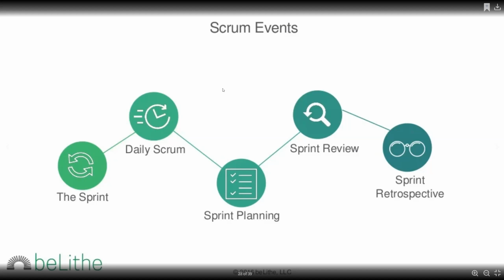So sprint planning also goes deeper. We're going to take each one later on and go much deeper to break them down, because it involves what we call t-shirt sizing, which means the user stories are planned, and then we have to t-shirt size them. T-shirt sizing means, is this a small, medium, large, or extra large? That's how you assign the user stories. So it's a planning that involves all stakeholders. The development team is available, design is available, QA, they're all available, and they all have their input so that we are all on the same page. And then we're moving as a team, as a unit, and we're able to identify any issues.